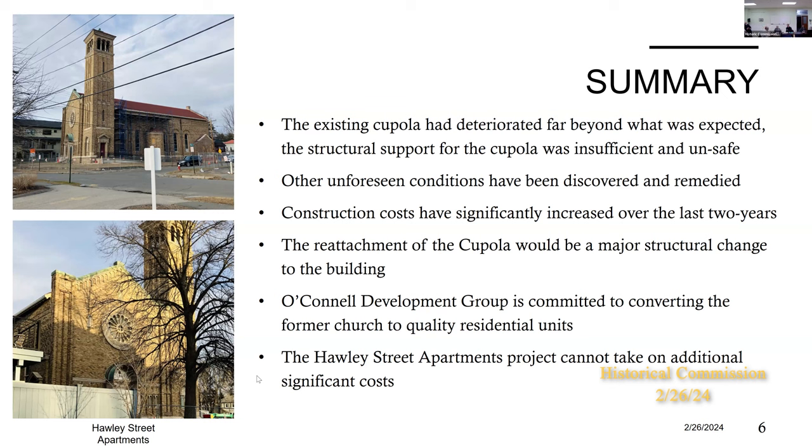Well, to continue the discussion, I'll agree with Barbara. I think we have a project that's funded by state money, which is dedicated to the purpose of historic preservation. We have a condition that accompanies that $500,000, which requires, it sounds like two requirements, a historic structures report, which envisions restoring the cupola or repairing it in place. And we have a formal legal document that's gone through the state level process of Massachusetts Historical Commission, which specifically cites the Secretary of Interior standards. So we're in the realm of preservation law here, and very specific.